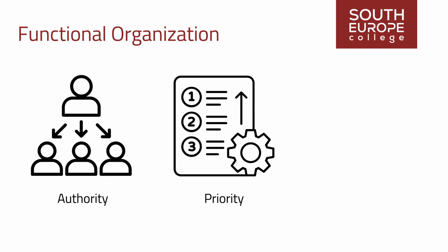Priority. The stark reality is that projects rarely get 100% of any functional resource's time assigned to them. It is not uncommon for a functional manager to lend 25%, for example, of a resource's time to a project effort. These resources always continue to have responsibility, typically operational work in their home department, and they frequently need to make decisions about prioritizing project and departmental tasks.